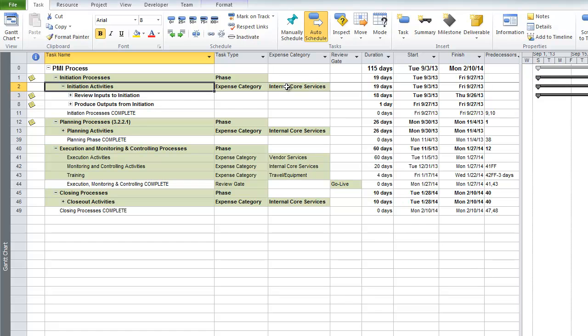So when we estimate our financials, we want them to align to the schedule, but we don't want all the detail of the schedule to affect our financials. We can do financial projections in Project. However, there are certain security concerns about locking down the information. If you have a 1 hour task with a resource of a certain rate on there, it's impossible to hide what that rate is without some custom solution. So in this case, we're moving the financials into a separate system, but we're integrating it back in with the project schedule so the two are always in sync.